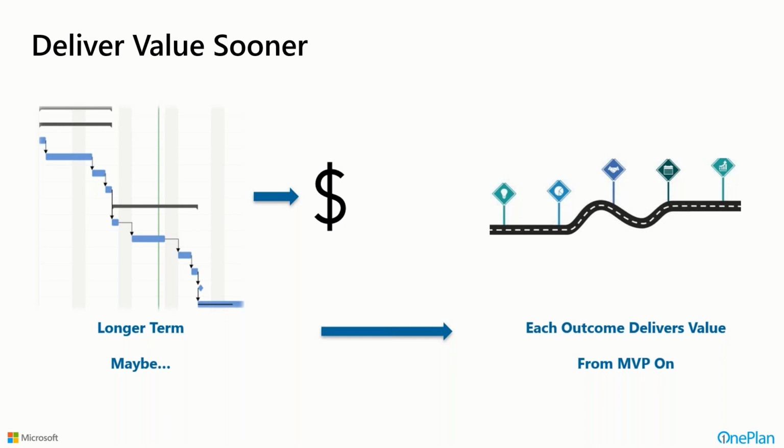With the idea of a more product-oriented, roadmap-oriented focus where we deliver incrementally, we're funding minimum viable products or MVPs, and maybe releases or different features incrementally over time, so that the investment is not a big investment up front with a big bang at the end that hopefully delivers. It's incrementally funding each of these iterations and getting value immediately after that iteration is done. So the expenditure of the dollars is more commensurate with when we receive the value.